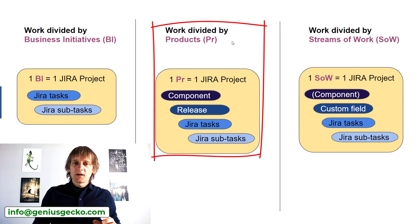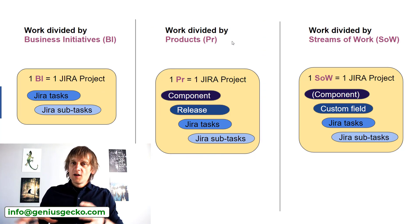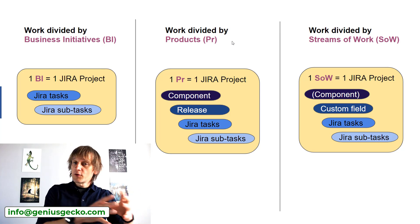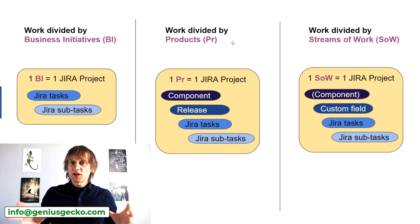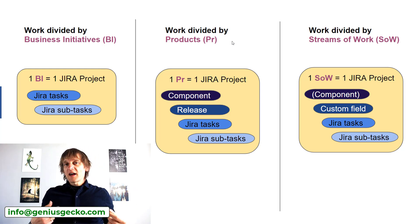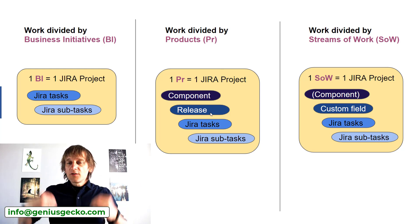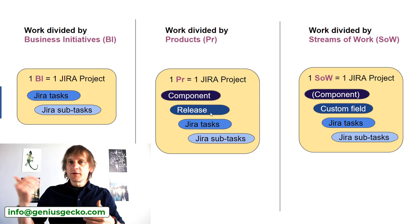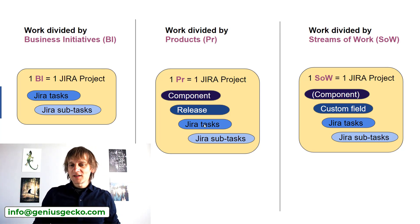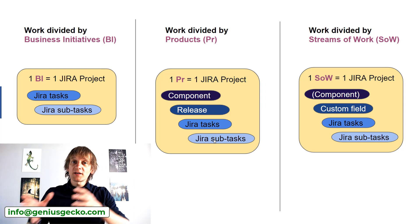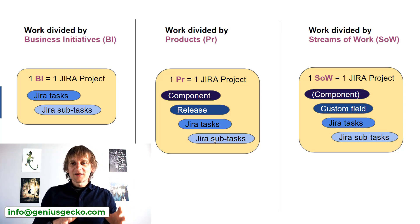The second approach is work divided by products. If you're creating products, it's also a good approach to create one Jira project per product. Each project allows you to create components, manage releases and new versions of your product, and inside those releases you have your epics, user stories, tasks, subtasks, and so on. One Jira project per product — simple as that.